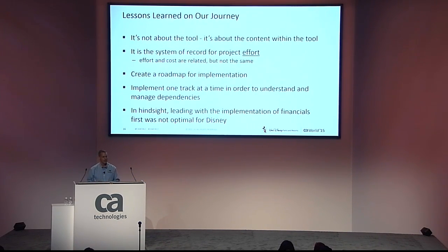Again, it's the system of record for project effort. They're related, but they're not the same, and that was a huge learning, particularly for our financial side of the house, because they're more concerned with when we pay the bills and what the cost is, but to project managers, we care more about how much effort did we expend and what's already been utilized and what's left to deliver